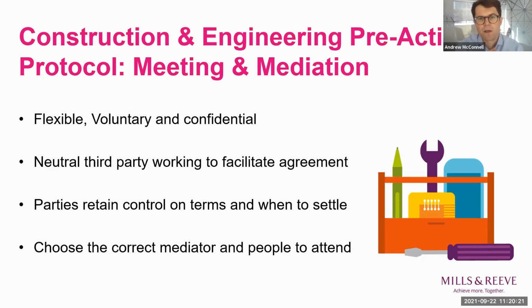But obviously, often mediation avoids expensive litigation, although there are obviously legal costs associated with preparing for a mediation, and you've got those of the mediator themselves. Mediation can provide a speedier resolution, so we're talking a number of weeks to really get a mediation arranged, which obviously isn't the case with court proceedings. Those can take much longer. Mediation has a high success rate, and I think quite importantly, even if a mediation doesn't resolve the dispute and you don't end up with a settlement, it's often quite a helpful process for the parties just to get together, listen to each other's positions and perspectives. That in itself can form a very beneficial process for everyone involved.